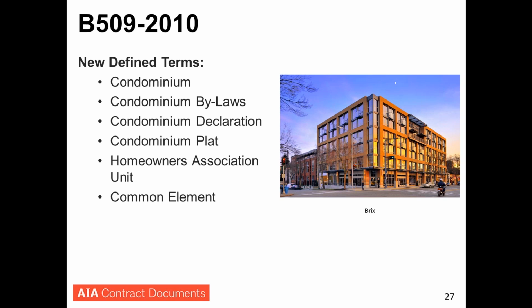In addition to negotiating your owner-architect agreement, you can try to negotiate with the developer certain provisions to be included in the condominium declaration or the condominium bylaws that would help to mitigate risks going forward. We will talk about some of those provisions, but the important thing is you have to expand your thinking here. You can't just think in terms of negotiating your owner-architect agreement.